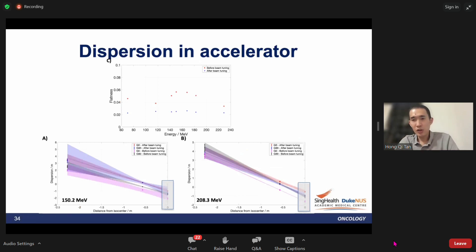One good thing about this is that after doing these measurements at the very start when we were commissioning, we found that the flatness of the gantry was not good, as shown by the red dots. It was less than 6%. When we did a dispersion measurement, shown by the magenta and black line, the magnitude was pretty high. When we showed Hitachi this and asked them to tune the beam and get the dispersion down, after tuning we got the dispersion shown by the red and blue line, and the magnitude is definitely lower. After tuning, the flatness also improved—everything is better than 3%.